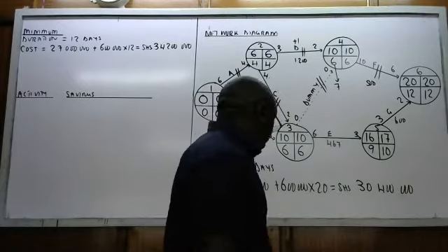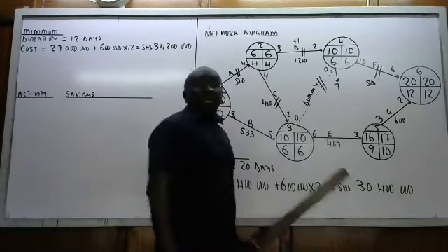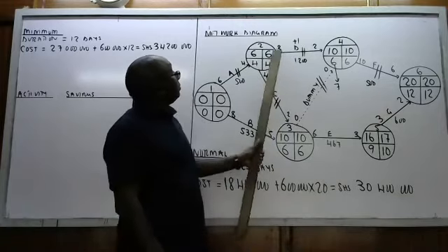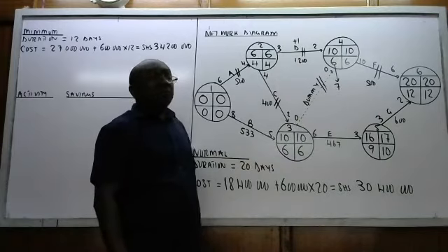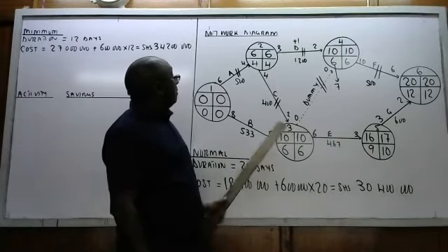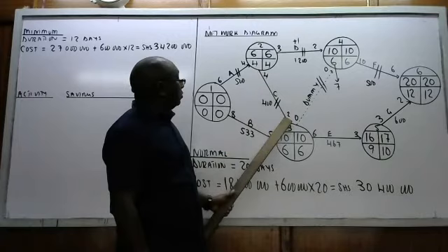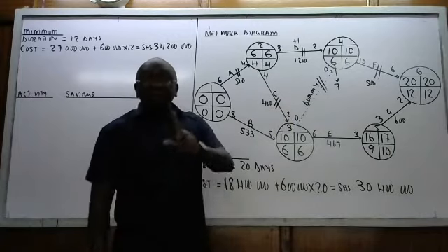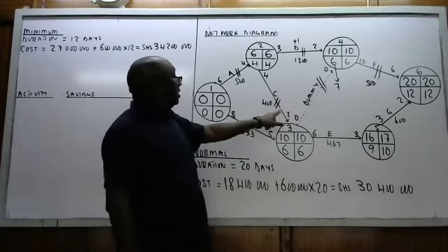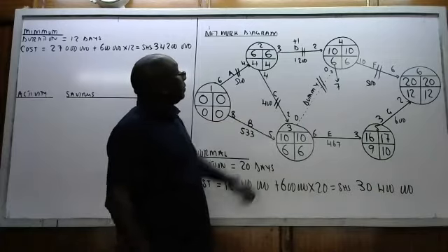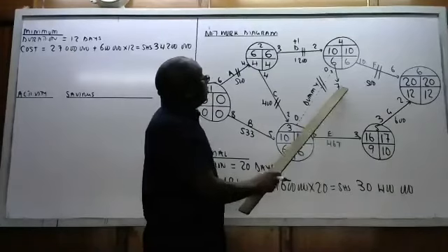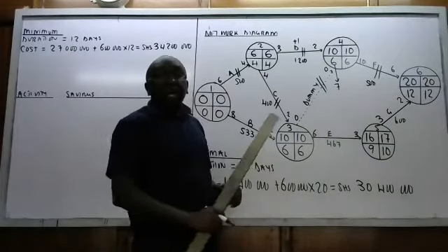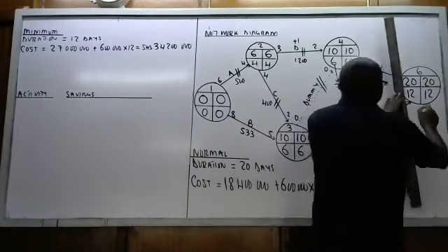Good. All right. So we are checking now the implication. So here I said going forward, it is 7. Now, if it is 7, remember this one was 4 plus 2, 6. So that therefore means when you do that, this is no longer critical. Going forward, you will say 7 plus 6. So instead of 12, this is 13.